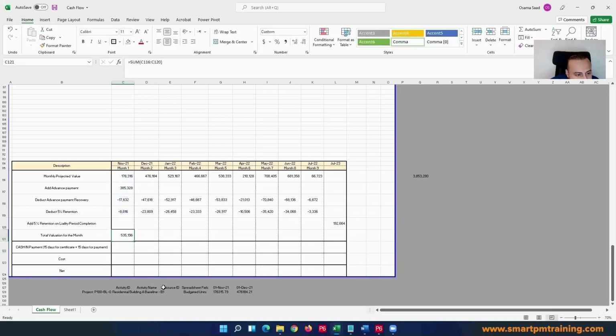Okay. Yeah, so the first month is really high because I have advance payment, but let's drag it like that and see what's happening. So the second month in the project, I'm expecting $476,000, but at the end, I am getting in the bank 404 only.